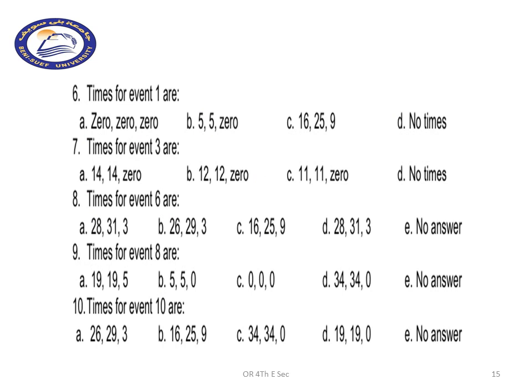Now we go to the rest of the questions relating to the numbers we calculated now. So question number 6 asks for the times for event 1. Like we said, event 1 is the beginning of the project, will have 3 zeros. So the answer here is A, which has 0 earliest possible starting time, and 0 latest possible starting time, and 0 slack.